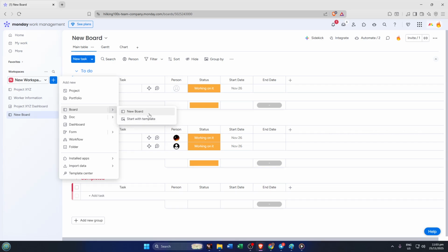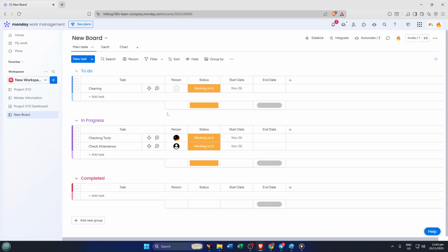Now, pay special attention to the columns you add. For effective scheduling, the timeline column is critical. This allows you to define both start and end dates. So you're not just marking when a task should begin, but also its expected length. It makes a massive difference because this feature powers those dynamic views like the Gantt and timeline displays. Super valuable when you have overlapping tasks.